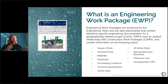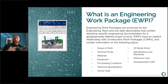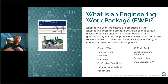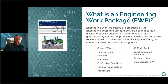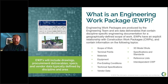An EWP contains: scope of work and terminal points, a material takeoff, equipment included (pumps, motors, etc.), pre-existing conditions, technical specifications, vendor data (especially for equipment packages), 3D model shots for visual clarity, reference lists, and which CWP it relates to. The EWP includes drawings, procurement deliverables, specs, and vendor data, and is typically defined by discipline and area, with more granularity possible depending on project complexity.